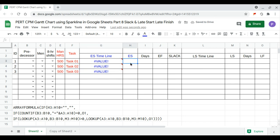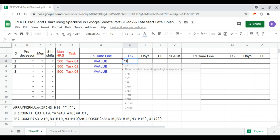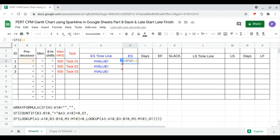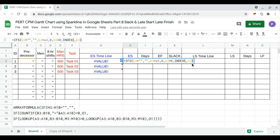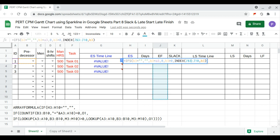We continue with the early start formula, which is equal to IFS: if B3 is empty then it's empty; if B3 equals its own ID then zero, meaning it follows itself; if B3 is greater than zero then INDEX over the early finish column — which references the entire J column — and press Enter.